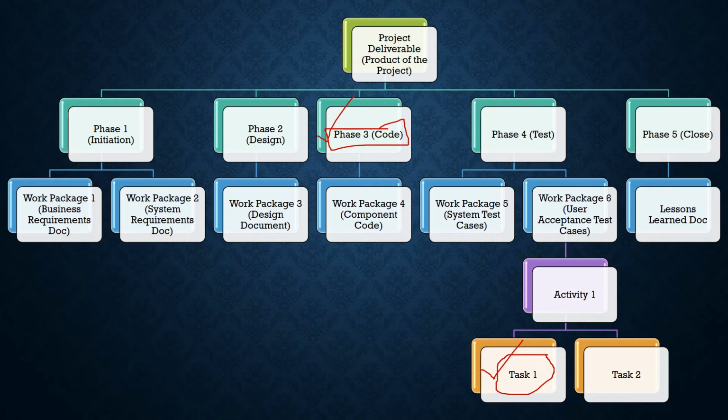But for large projects, reporting the percentage of code might not reflect the right picture. Let's say you have to code for four different modules, and you report 50% completion. That is not accurate. It is quite possible that two of the modules have completed coding 100%, while the other two have not even started.